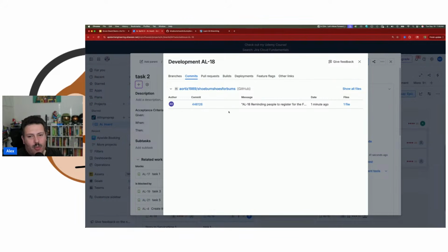And it's very important, folks. As you see commits, this is good. This is indicating to you that your developers are actively working on something, folks. This is the key part. They're actively working on it. If you stop seeing commits come through, that is no bueno. That usually means that your developer is not actively working on it anymore. And if they are actively working on it, it usually means they're stuck.